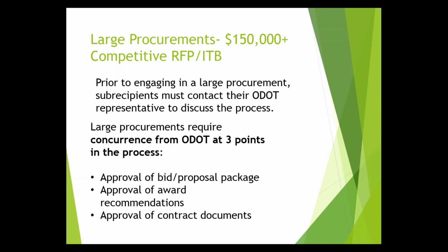At that point, you're going to make the award, and then the last concurrence is going to happen around the contract that you have with the vendor you've chosen. Once we say, okay, go ahead, you're going to work on your contract. It's important that your contract be approved by your agency's legal department or legal counsel prior to coming back to ODOT for concurrence. We're going to want your legal to have reviewed it and said, yes, this is good, it meets all of our requirements.